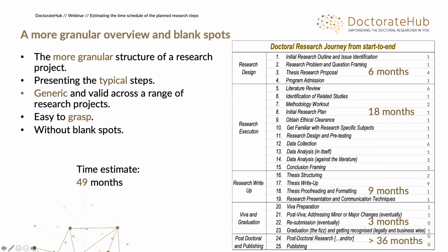Now, having said that, this is still a very optimistic estimate, and that quickly can change to something more around that number of 61 months. And if you hit this number, then you can foresee already a number of problems. For once, if you're enrolled in a full-time program, you will understand it's well beyond the official duration that you will be given.